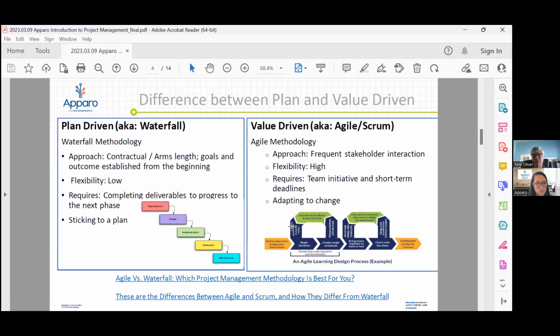And again, the graphic that we have here is very good because it shows this process. And this little loop here shows what we call an iteration. An iteration is typically between 1 month and 1 week, with the most common being about 2 weeks. And they repeat. So you can have a few iterations.